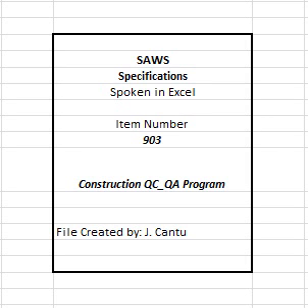B. Reports shall reference specification section. C. Reports shall also include subcontractor work. D. Reports should concentrate on work items that have been completed and provide evidence of control activities. E. Reports shall be submitted on a weekly basis, but always before request for payment on completed work. F. Reports shall reflect accurate and precise QC actions taken.